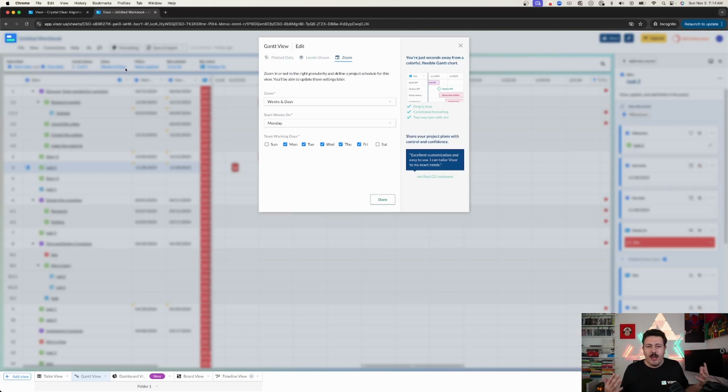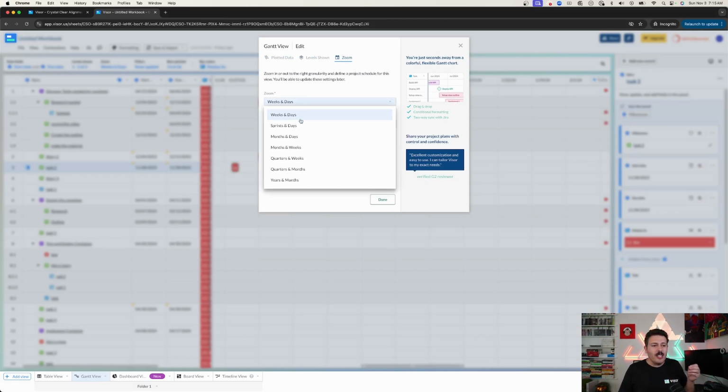Sometimes you get overwhelmed by all the information and you can basically select what days you're going to see. Maybe you see sprints, maybe you see months, weeks, quarters, years, whatever is appropriate for you and your team. You can do that there. And then you can also select what day the week starts, so whether it's a Monday or any other day that you want. And then we have which days your team works. And so you have a lot of customization there.